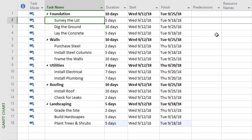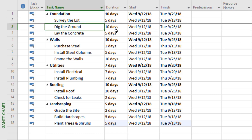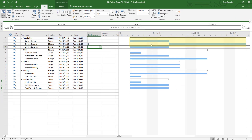Surveying the lot could be the first task on the project, so it wouldn't have a predecessor. With digging the ground, though, we can't do that until we've surveyed the lot, so that predecessor is going to be number two. Those numbers correspond to the numbers on the left-hand side of the activity pane. After we define that relationship, you'll see on the Gantt chart that surveying the lot and digging the ground are now connected with an arrow — one has to happen before the other.